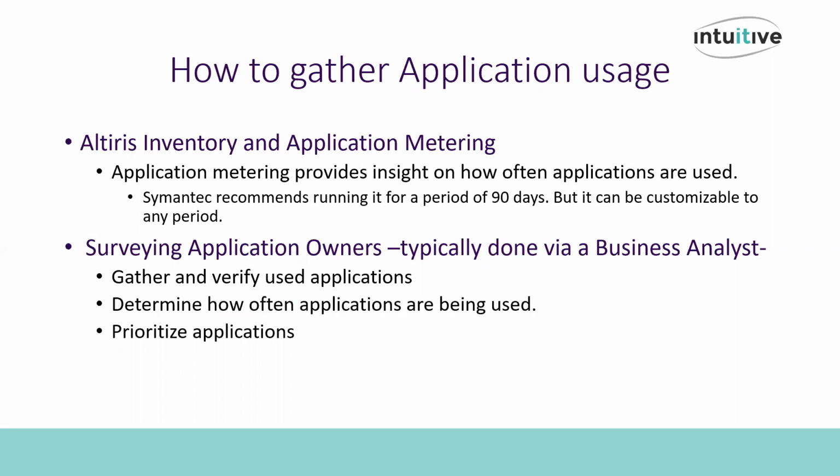Another option is to survey the application owners. This approach would take significantly longer and would require a dedicated resource to the project. For this kind of task, a business analyst is typically required. Also, keep in mind that usage data will be purely based on the end user's perception. In other words, you have no way of verifying if the user truly used the application daily or once a quarter.